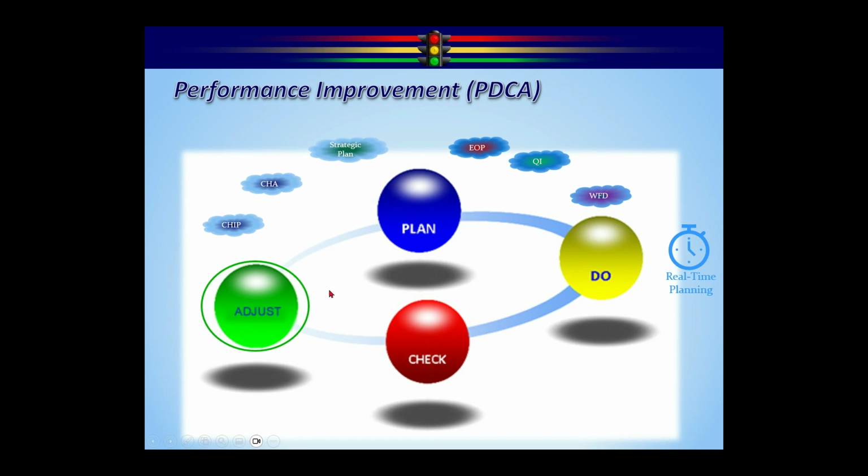Now, let's assume for a second that the top of that chart I just showed you, which by the way is called micro level performance monitoring, so I'm down at the objective or activity level, was only at 21% at the peak and not 25. So we didn't quite make our target. Now we've got to make a decision. And the decision comes down to one of 2 things. Is the plan too high? Is it just not attainable to get to 25%? If we decide that's the case, we're going to adjust the plan down to 21, continue the execution, check it every once in a while, and try to keep it at 21.